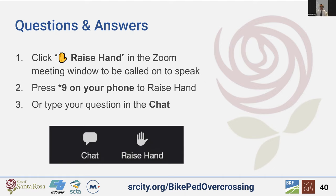To clarify, the right-of-way phase, which includes any land acquisition and utility relocation, so there are two things going on in that phase, is estimated to cost about $2.3 million. That's why I said $2 million: a significant portion of that $2.3 million is expected to go to utility relocation. Thank you. You're welcome.